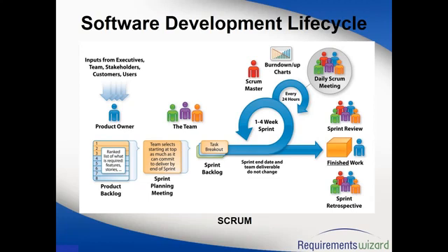Yeah. Correct. That's why I said that in Agile you don't have a PM role. You just have a Scrum Master who is there to help the team. He or she cannot tell them, okay, do this or do that. They cannot supervise or boss around like PMs would do. Here, the goal is to make sure that things are moving and there are no impediments or obstructions. If there are any impediments, problems or obstacles, then the Scrum Master will come in and resolve them.